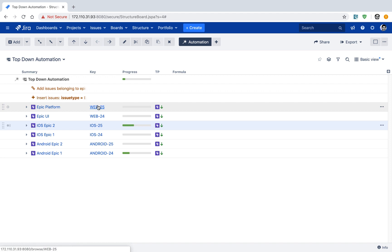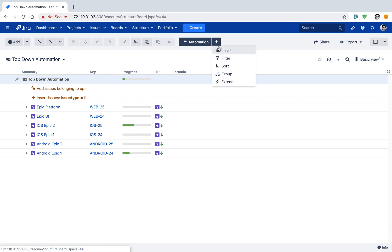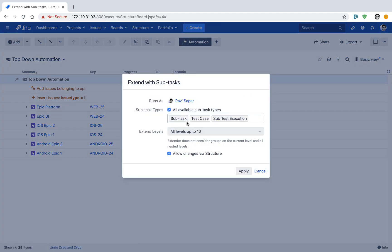The last thing to do is also include subtasks under the stories. Select the Top Down Automation option on top, click the plus sign again, click Extend, and then select subtasks. You will be presented with the option to select which subtask types to include — you may have two or three different types in your Jira instance. Select the ones you want and also check the option Allow Changes via Structure Board, so that you can change your project from within the structure board itself. For example, you should be able to move a subtask from one issue to another. Then click the Apply button.